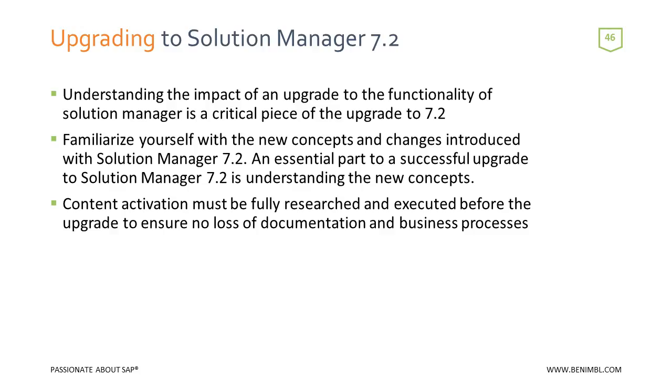So, the concept to upgrading, there's a number of things you need to understand, right? We talked about already, you need to make sure you're familiar with the new concepts and changes introduced to 7.2. As with any upgrade, it needs to be a calculated decision and you need to understand what's going to change to the processes that you currently use so that you're prepared. Clearly you're going to want to do that in a development system so that you can test and see what changes are introduced so you're prepared for upgrading production.